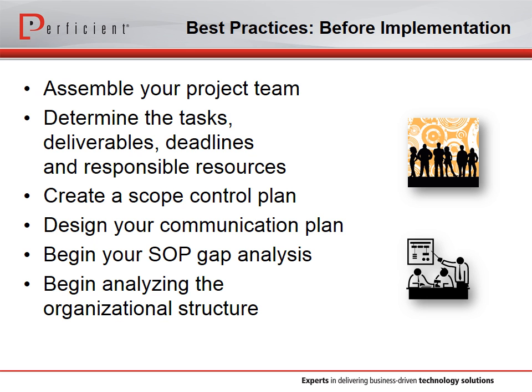So let's look at some best practices for before implementation. Prior to beginning your implementation, here are some steps that we recommend you take. Assemble your project team, making sure that you include, again, representatives from all of the stakeholder groups, including IT and each area of the business that will be affected by the new system. Determine who's going to lead the project, who will have authority to make decisions, who will be part of the core team, who's going to be part of the extended team. Decide how often the core and extended teams will meet and how much time in between meetings each member will be expected to work on that project.